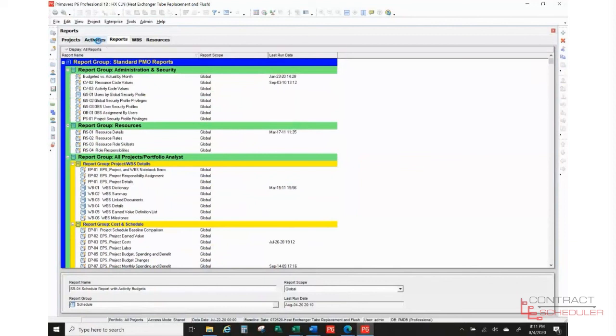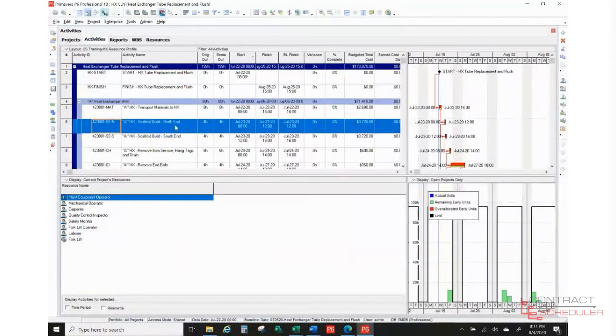So we can go back here. You can see it's really no different than building the schedule. The only difference really is making sure that you have cost rates associated with each of your resources, that you remember to include your materials and any overhead, so you really get a good estimate for the job. And then we showed some different reports and layouts that you can use to get some good information.